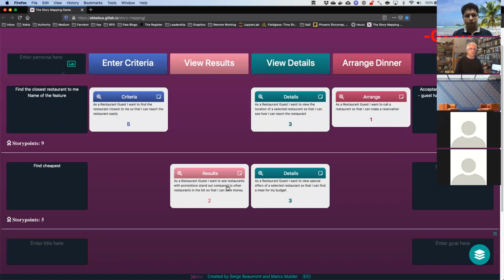One thing maybe to help you is that you keep the process a bit generic, and corner cases could also be slices, right? In the beginning, you just deal with the common case, like people just pay with a credit card. Fine, let's implement that. And then later you have a more complex flow, which is not as common, but now we can also pay with gift cards, right? And now we start implementing gift cards. So exceptions and corner cases and things like that could also be versions of slices.